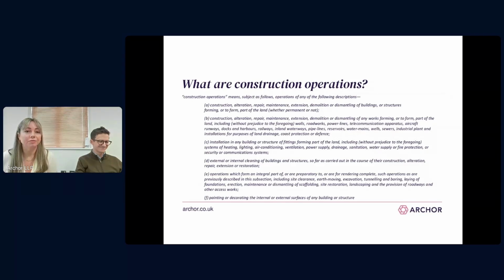Section 105 of the Construction Act then sets out the meaning of construction operations. As we said back in session 2, if you take the time to read this slide, it's actually quite interesting what is covered. Repair and maintenance contracts are covered, site clearance is covered, scaffolding is covered. Sometimes not even a building, but something that amounts to a structure is covered. Painting and decorating is covered. So these are all construction operations, which means they're construction contracts.